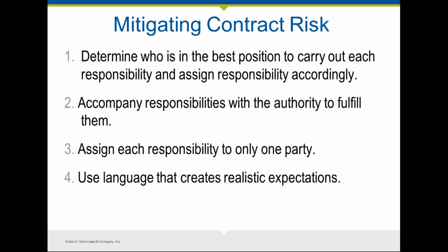You want to make sure that it's clear that it is the contractor who's responsible for site safety issues, because generally in this relationship, you have no control over the site or the contractor, so you don't want to assume those kinds of responsibilities.